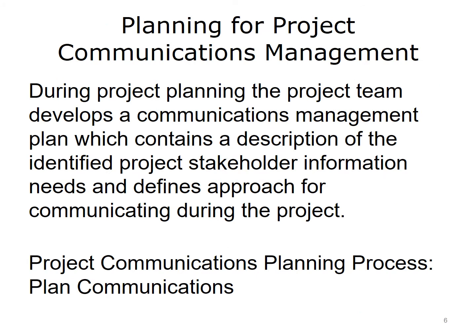During project planning, the project team develops a communication management plan, which contains a description of the identified project stakeholder information needs and defines approaches for communicating during the project. A communication requirements analysis is performed to determine the stakeholder information needs. The project team must determine what project information will be shared, who it will be shared with, when the information will be shared, and how the information will be shared.